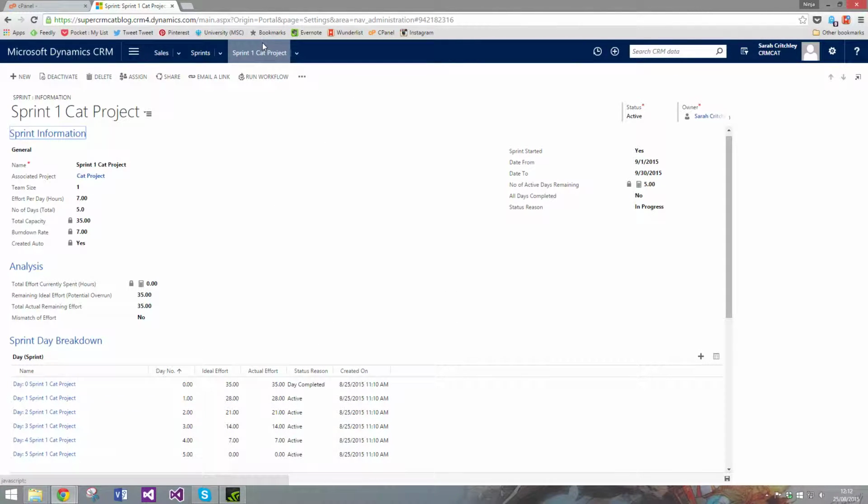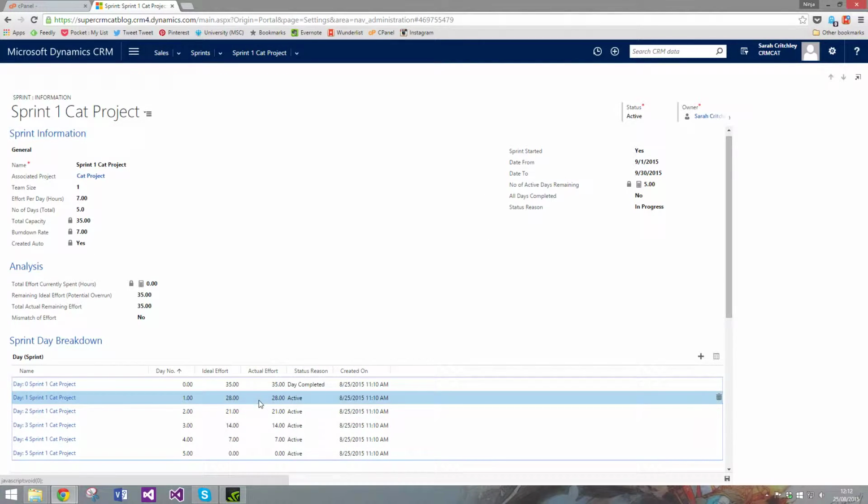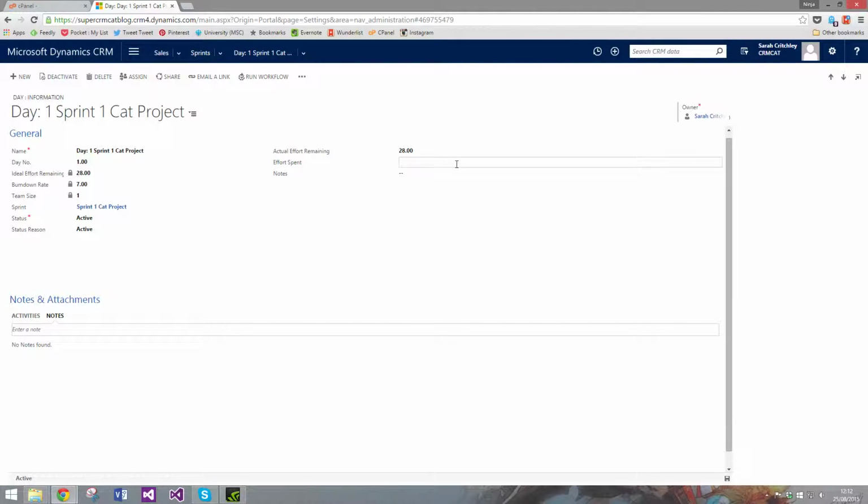So you can see that the day completed there, and let's have a look. Let me just input a little bit more info. So let's just say I've spent 7 hours. Day completed. The actual effort remaining, I want to say, is a little bit higher, just so we can see a little bit of difference.